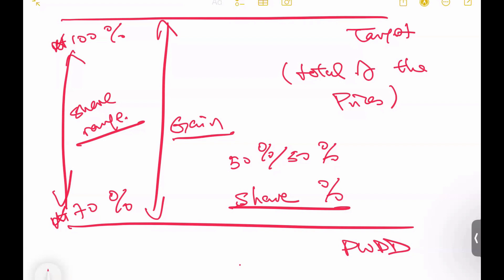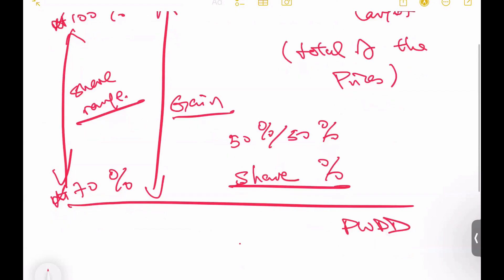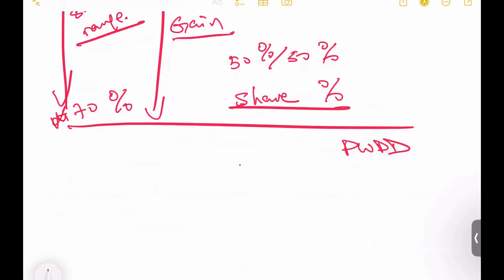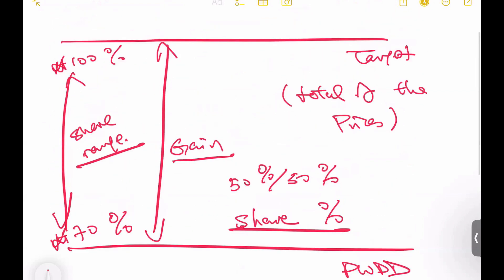Why do we need to use a percentage for the share range instead of an absolute number? The answer is the target will change. The target being the total of the prices will change. If we use an absolute number, we may go into some troubles when we want to manage this pain-sharing-gaining mechanism. Therefore, we want to set the target - even though it's changing, we set it as 100% and compare that with the PWDD.